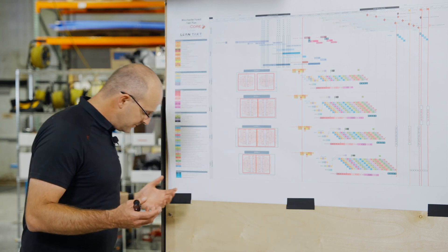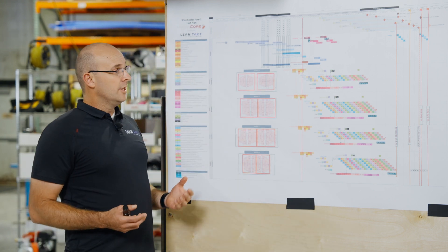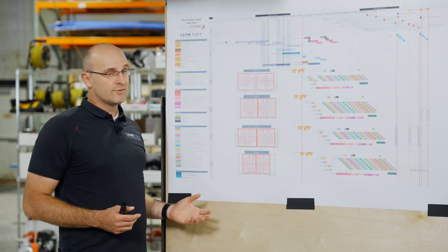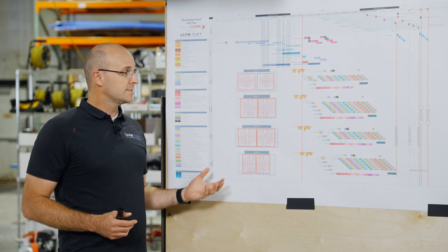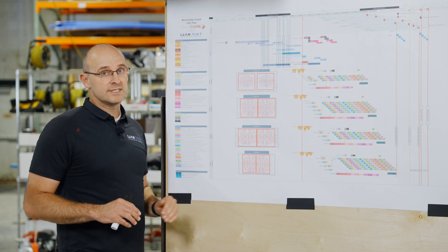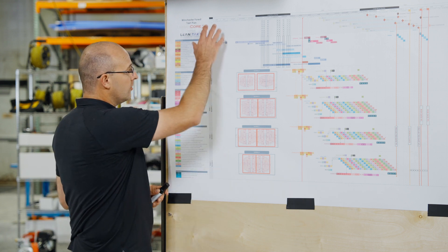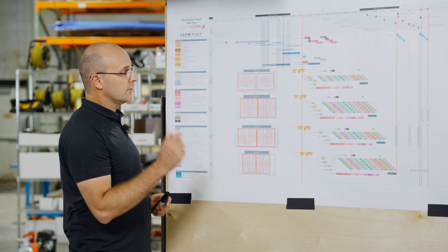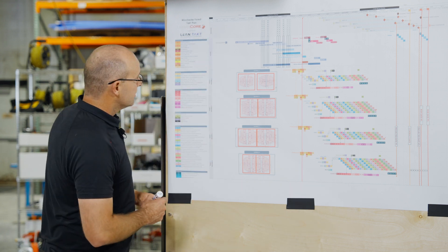You may be used to other schedules where you have deliverables, scope, or specific activities on the left. That's not the way we schedule in tact planning — you'll always find the location on the left.